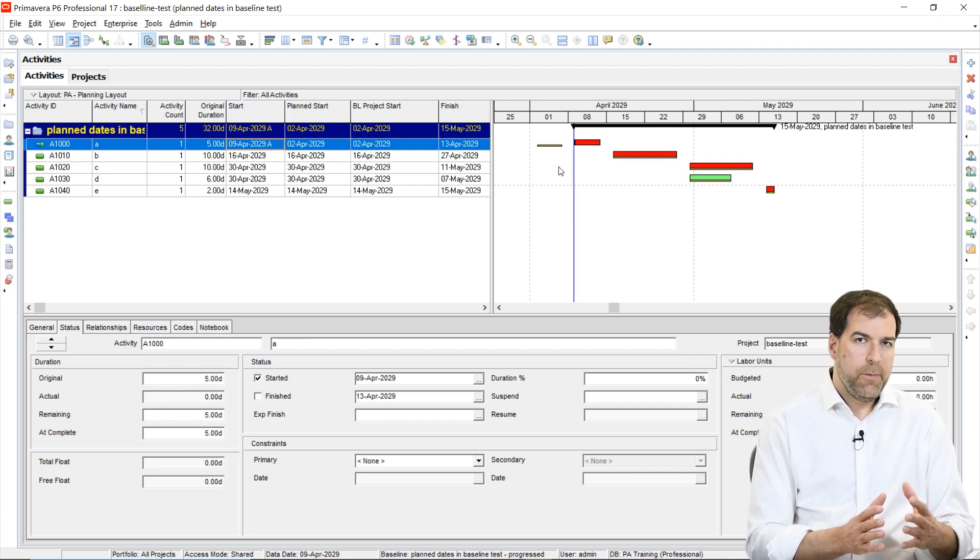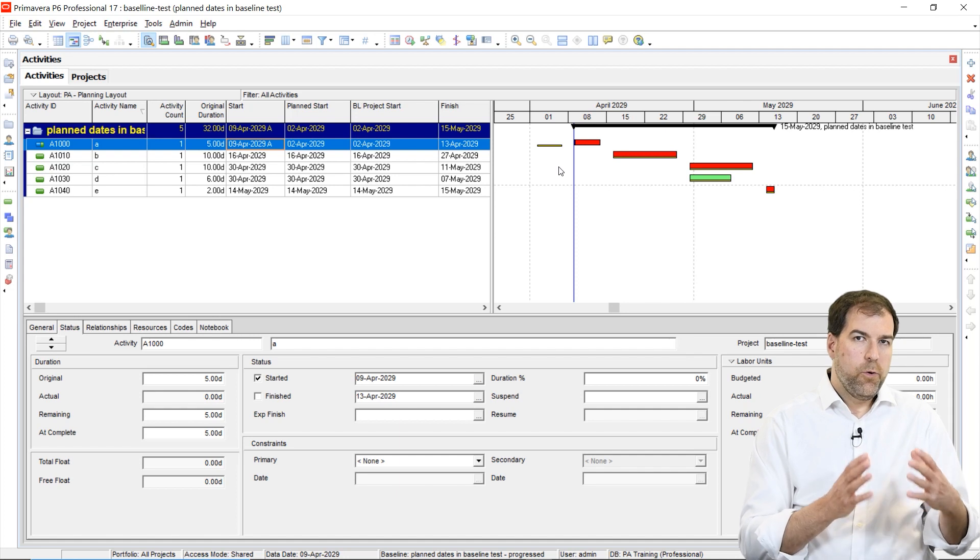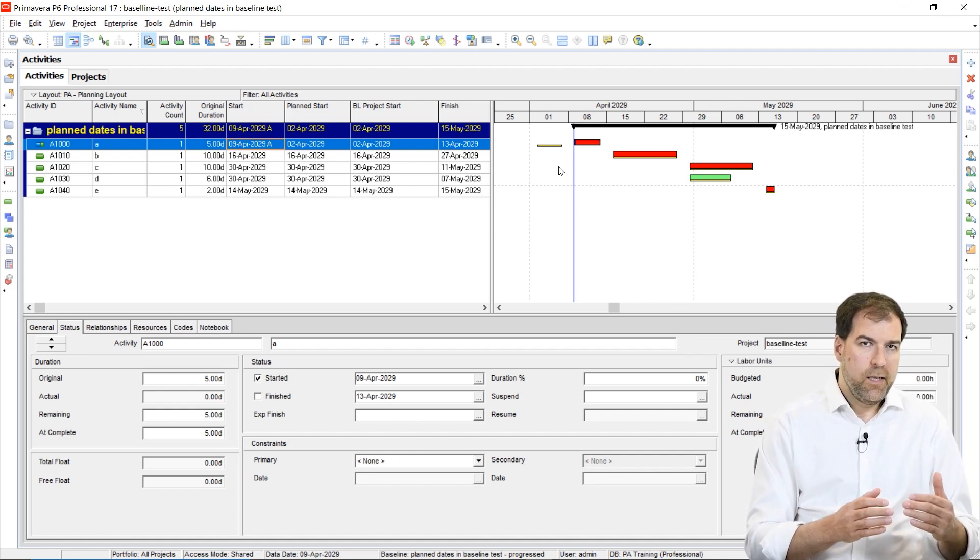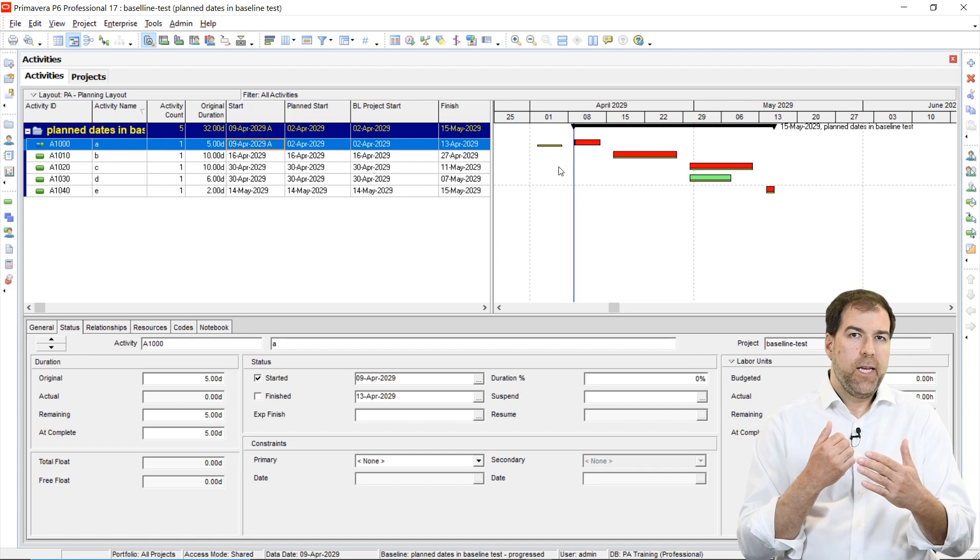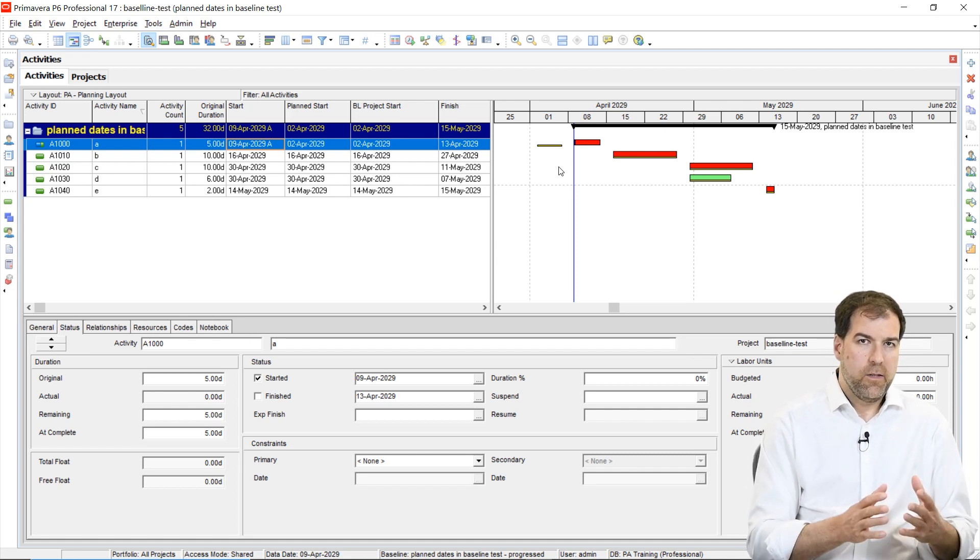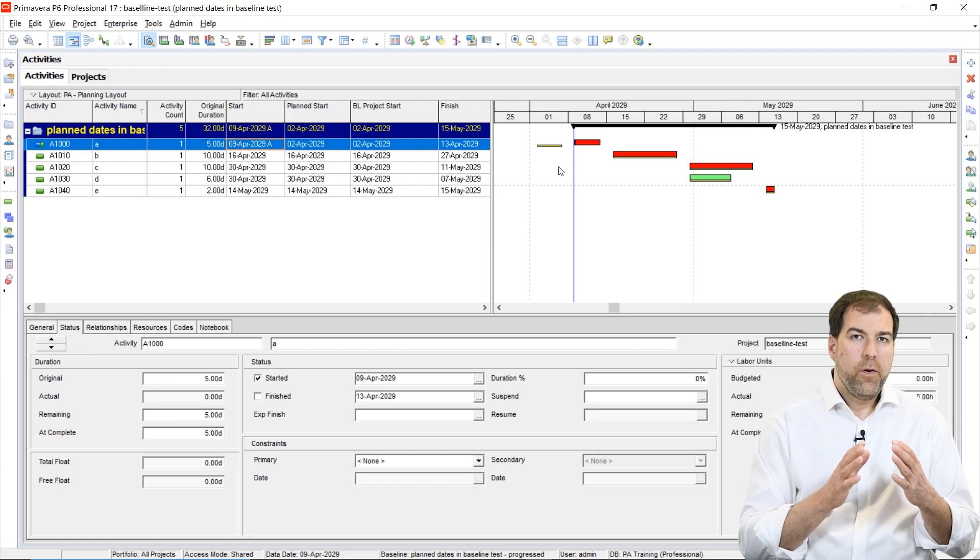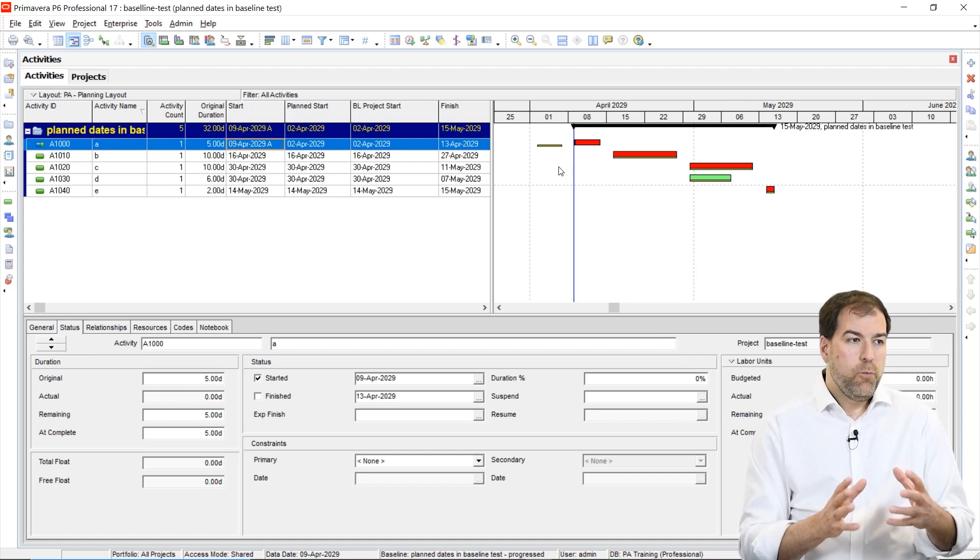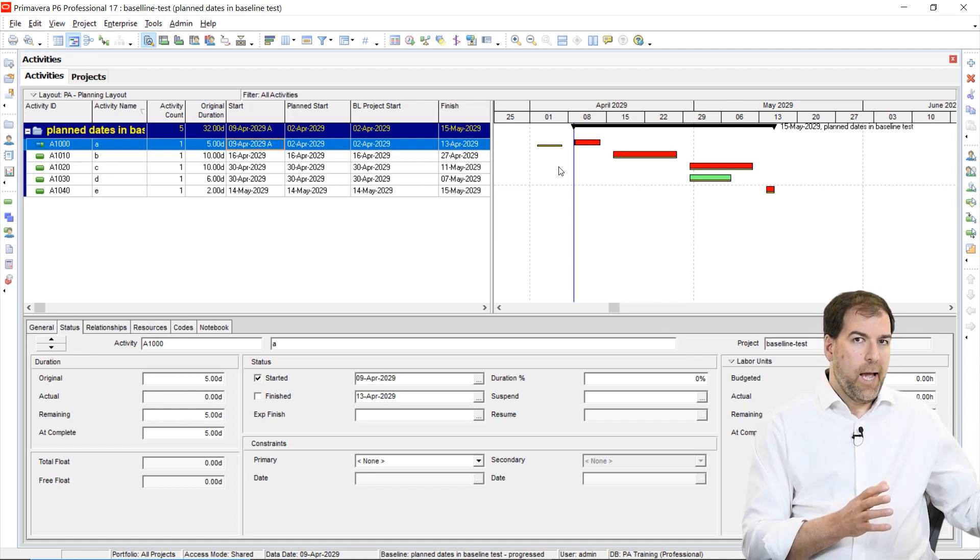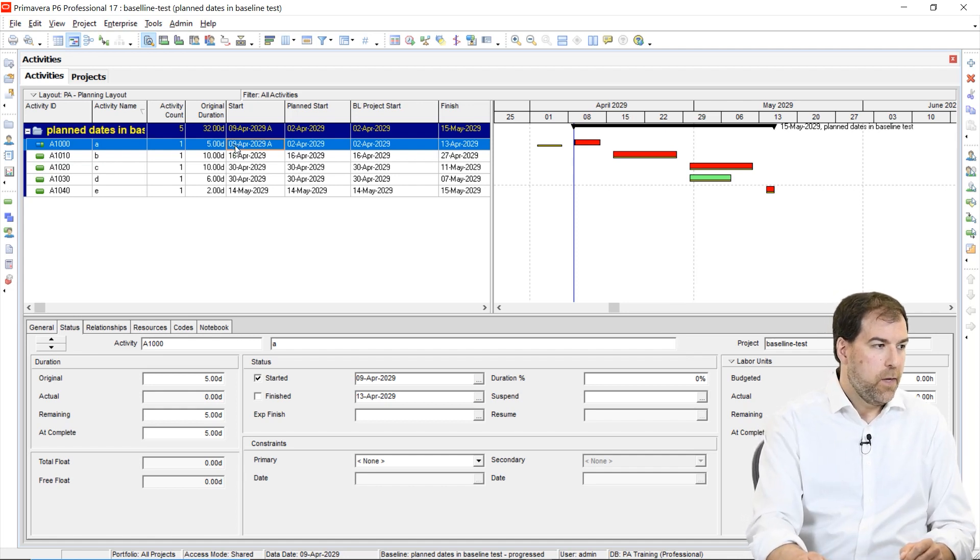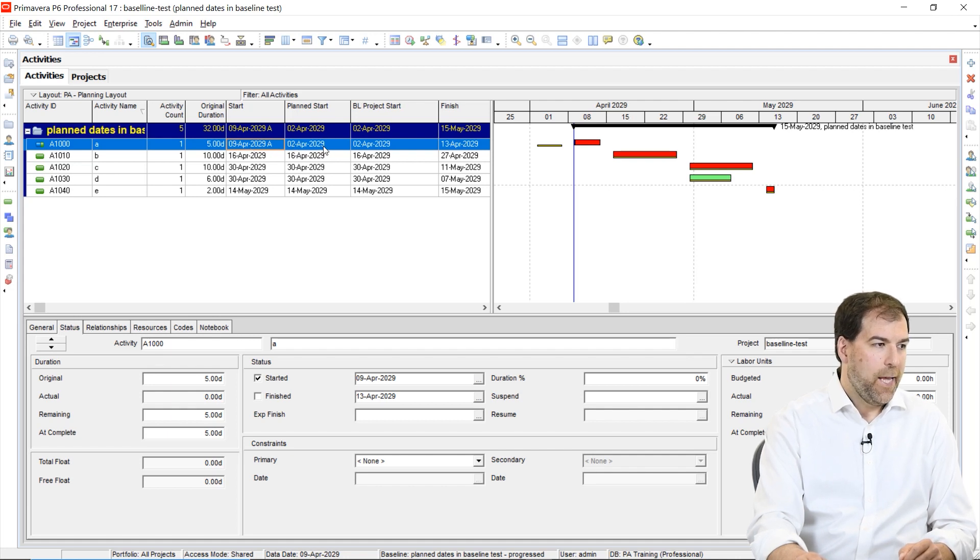So what's happened is that when we're using planned dates and using this setting with planned dates, we're actually displaying planned dates on our baseline bars. Normally we don't want to do that. We would like to have captured the actual start of that activity. So it actually started on the 9th, but instead we're displaying a planned start of April 2nd.